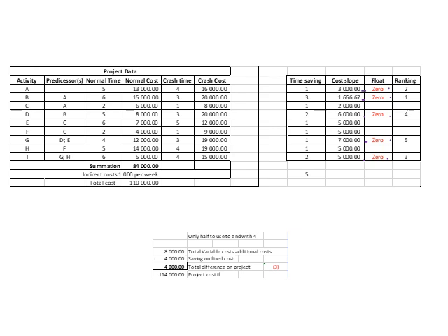Okay, so all of the data on this side is given, normal time on this side, and the time saving is also given or calculated here. So for item A, we can save 1 week: if we take our normal time and subtract our crash time, we can see we can save 1 week on this item. We can save 3 weeks on this item.